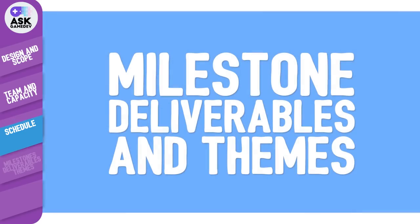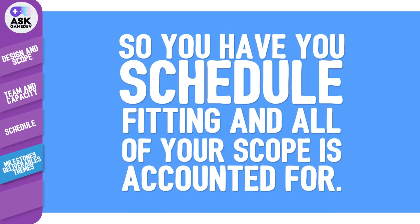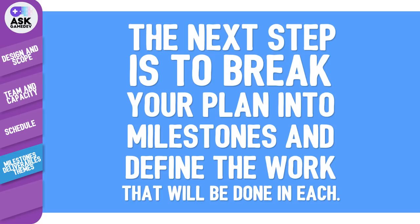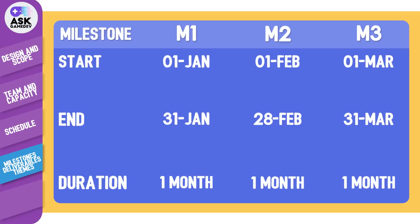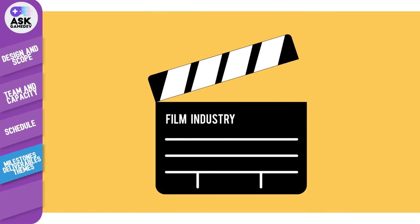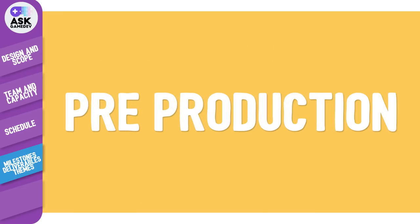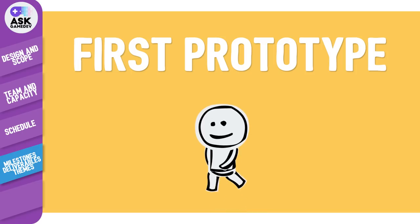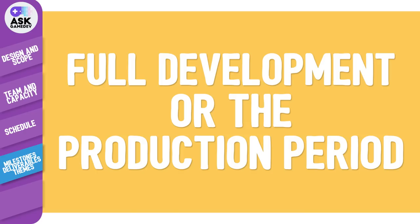Now let's talk about milestone deliverables and themes. The next step is to break your plan into milestones and define the work that will be done in each. Milestones can be any length and should be customized to your development goals, but monthly or four-week milestones seem to be common in professional studios. Milestones are typically where team leadership takes account of how they have progressed against plan and determines any changes needed to the go-forward plan.